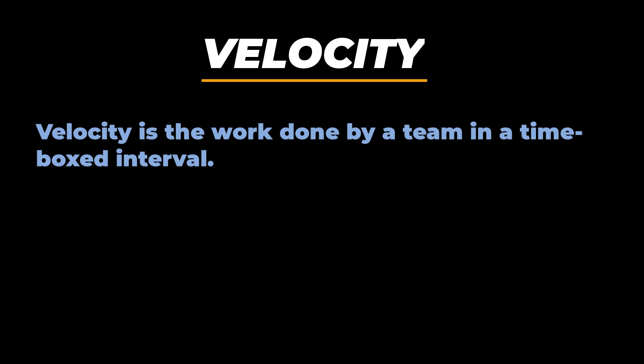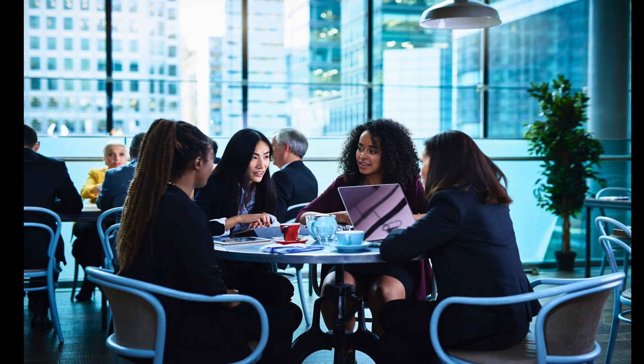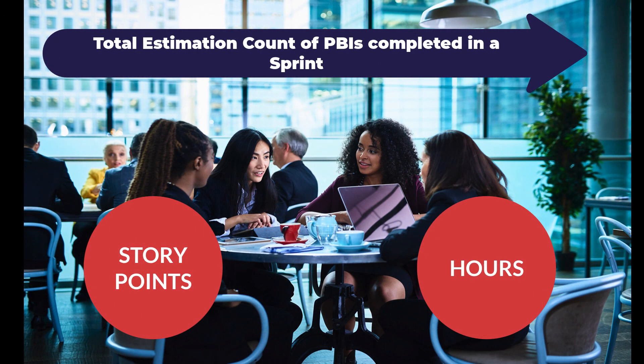What is velocity and a velocity chart? Velocity is the measure of work done by a team in a particular time-boxed interval or iteration. If a team is following Scrum, they define their velocity as the total estimation count of product backlog items (PBIs) completed in a sprint. The unit of measure can be story points or hours, depending on the estimation model the team is following. When talking about velocity, we should accept a few things with an open mind.